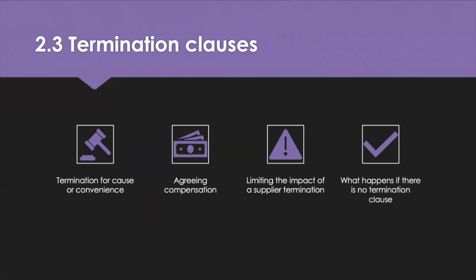So why do we include this termination clause? I think, when making a legally binding commitment to buy a supplier's product or service in a particular amount of time, it's not possible to tell what might happen during that period. So termination for cause or convenience to a contract. Termination for cause would definitely be a result of a major breach. But in the absence of that, then you can terminate for convenience. It's saying changing your mind. It's a no-fault termination clause.